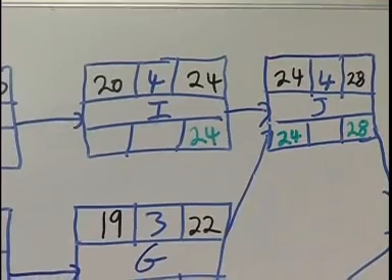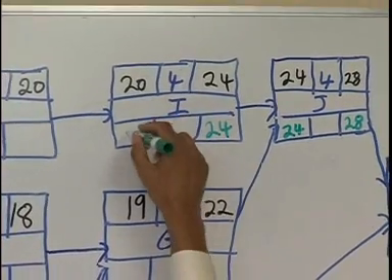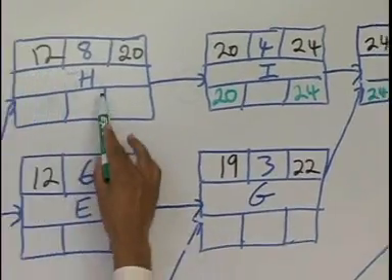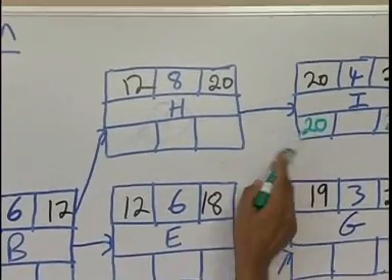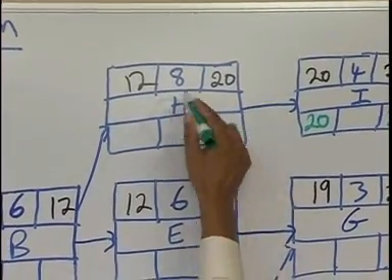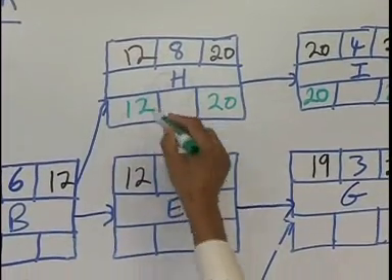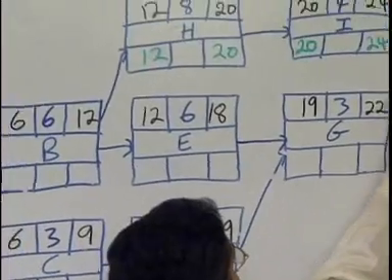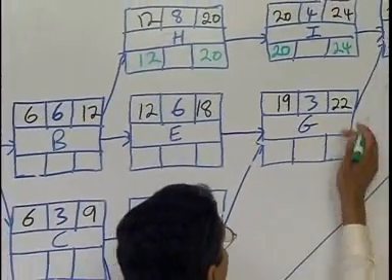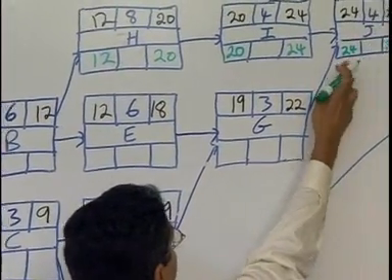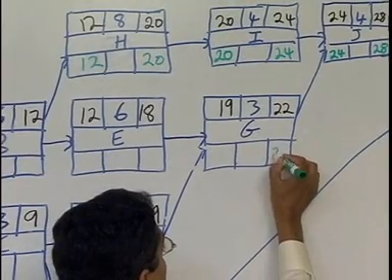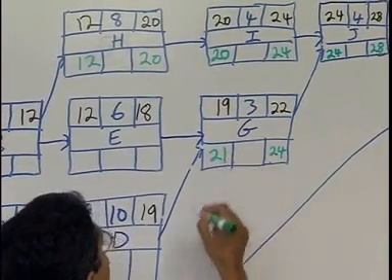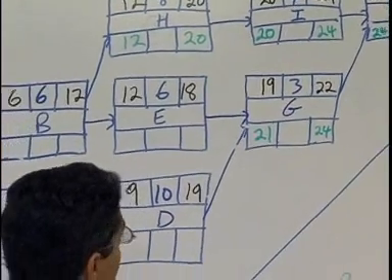So we go backwards now. 24 minus 4, 20. We go now to H. In H, again only 20 here. 20 minus 8, 12. G now. G is coming from J, so the latest start becomes the latest finish here, 24. 24 minus 3, 21. And let's go F.